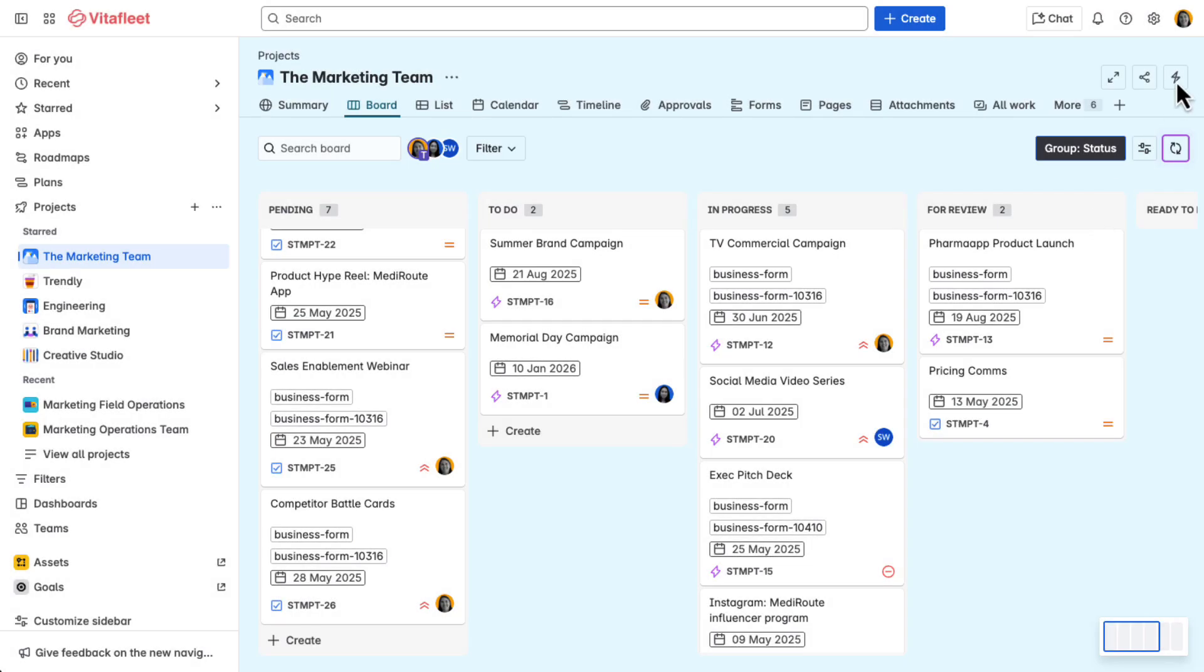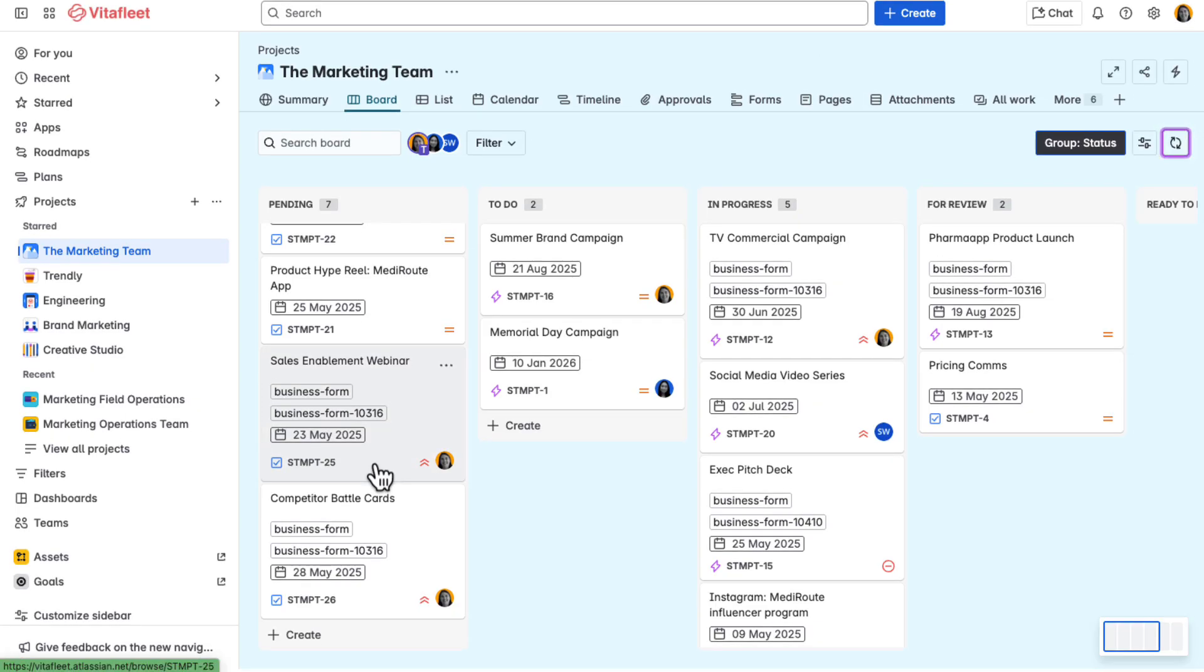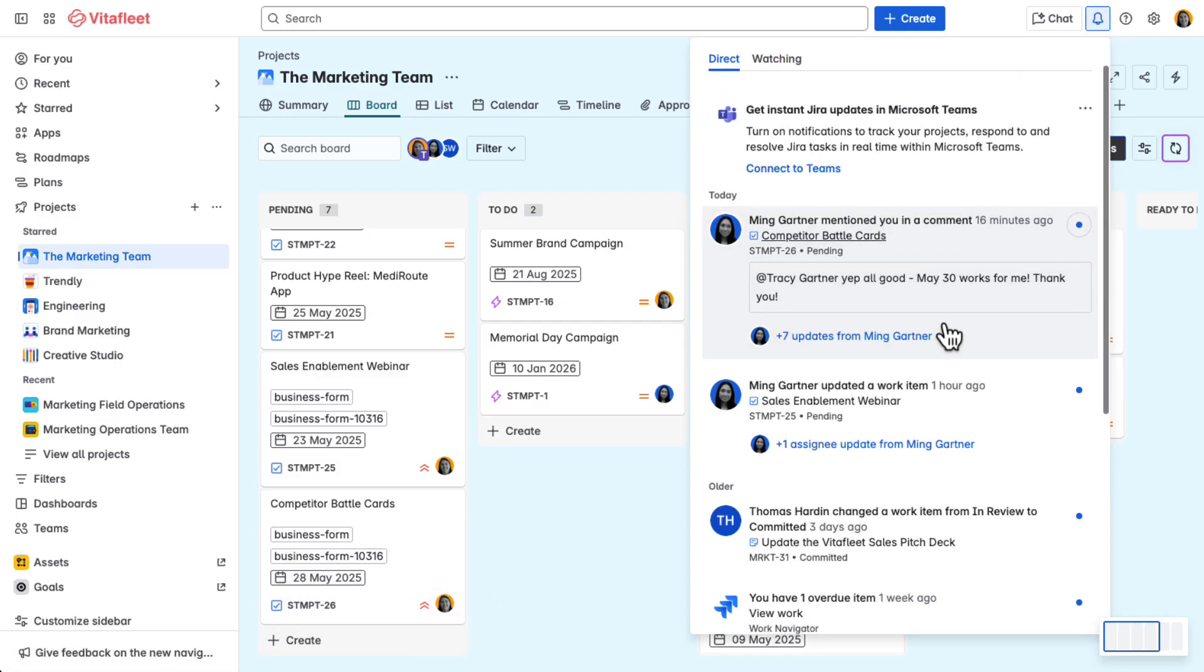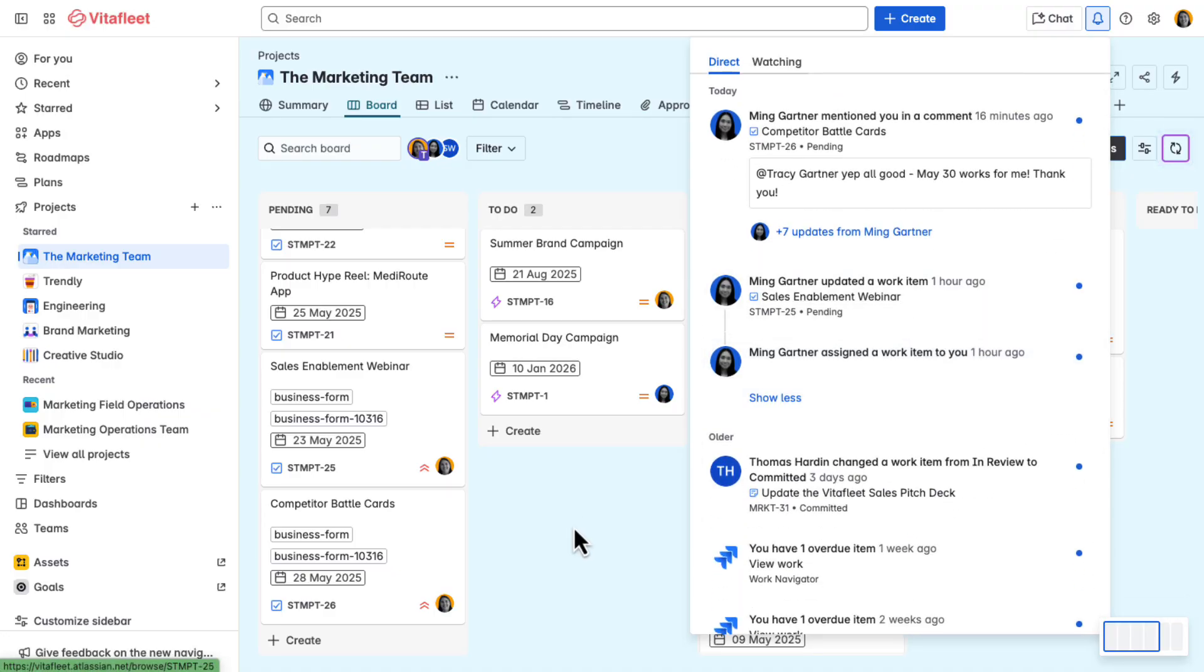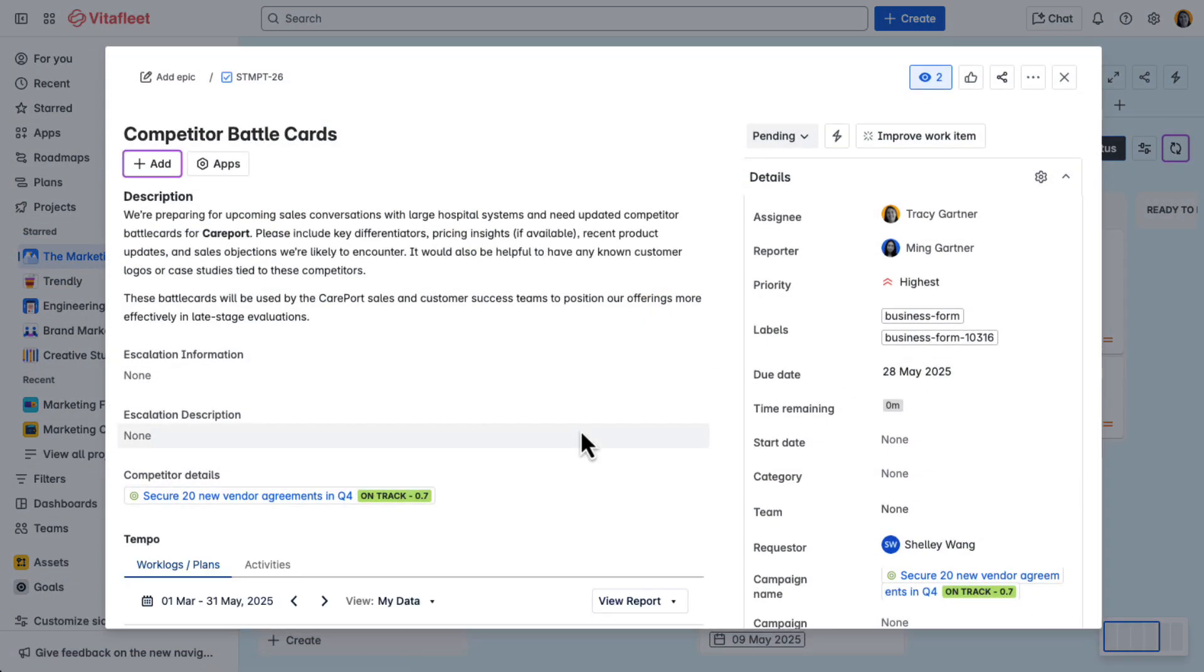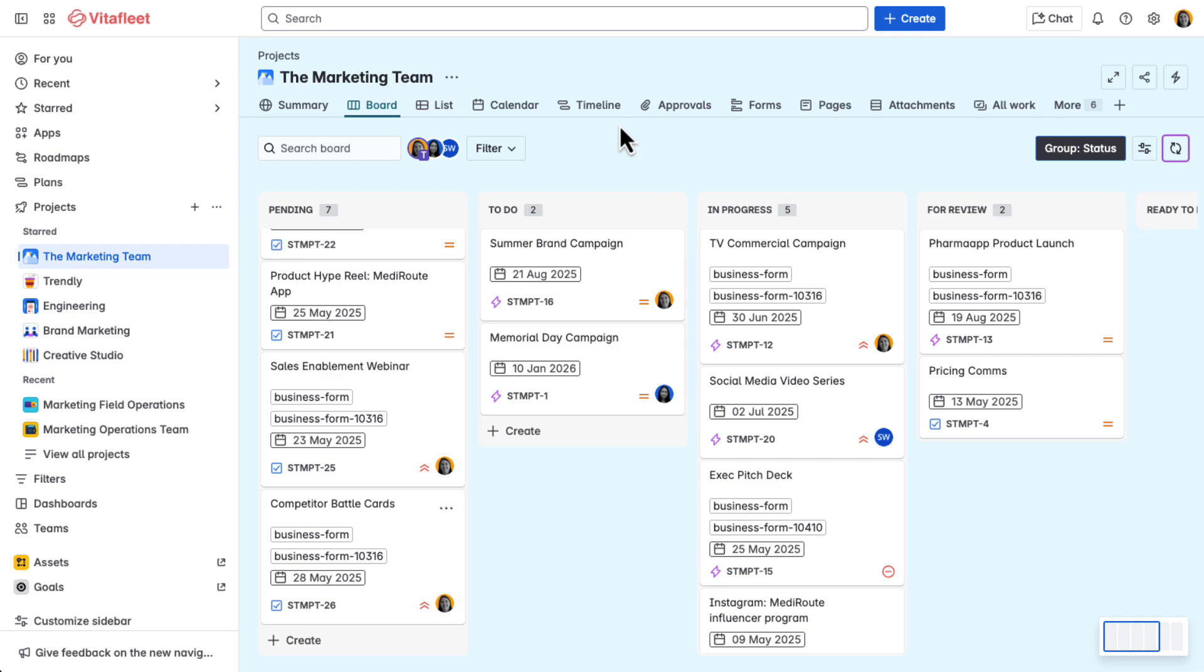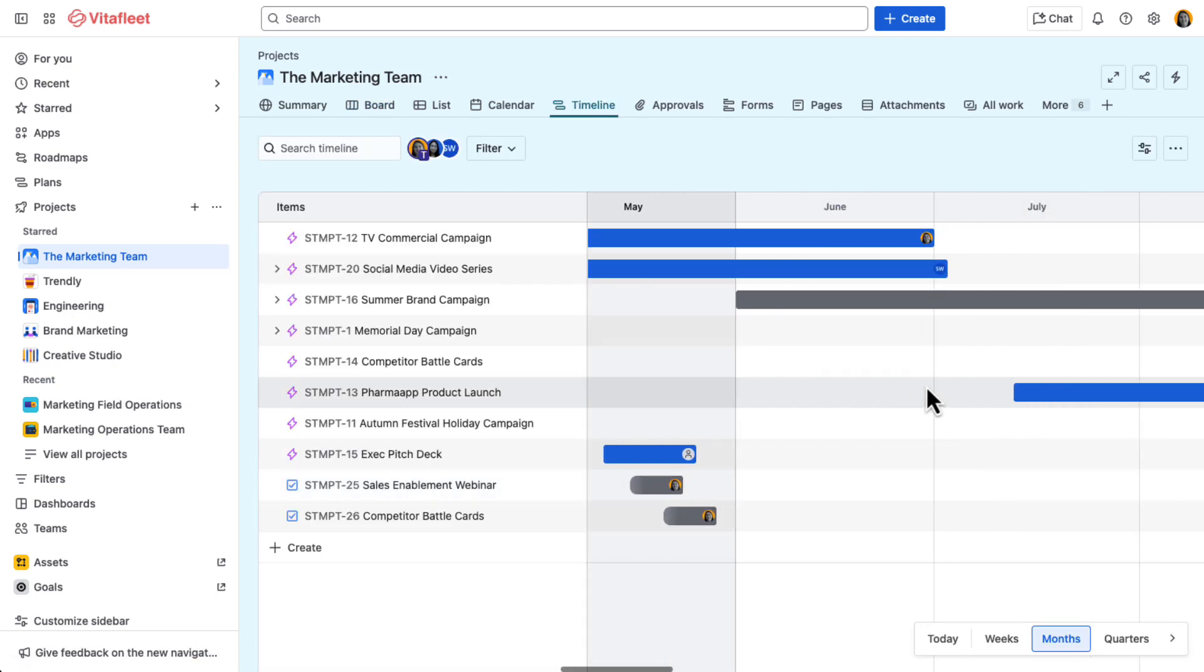Meet Tracy, the marketing lead at Vitafleet. The request from Ming is automatically assigned to Tracy, thanks to predetermined automation rules in the workflow. Tracy gets a notification and opens the request to review it. In the work item, Tracy communicates with Ming on delivery expectations. She also reviews her team's workload using the timeline view to ensure the deadline is feasible.